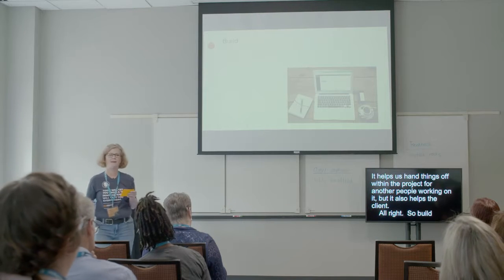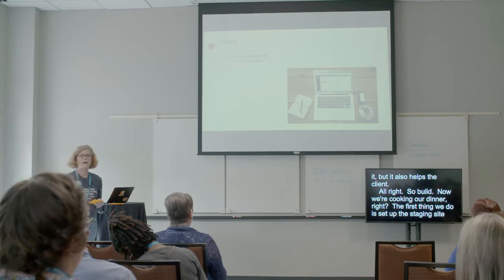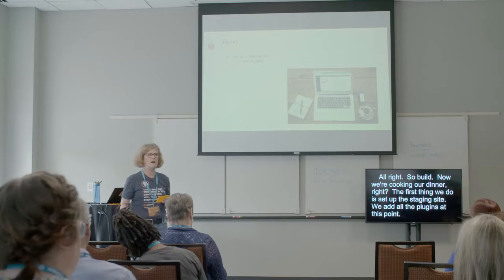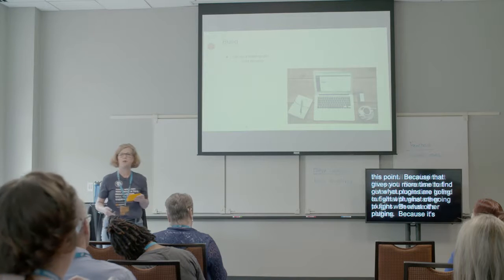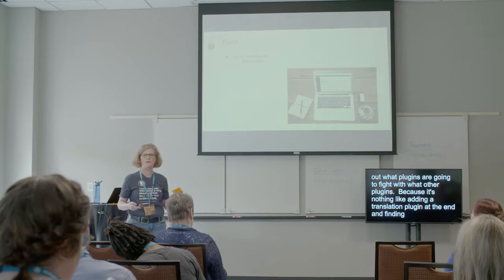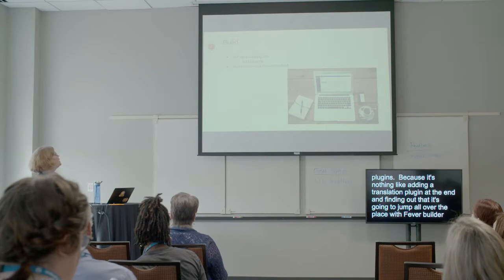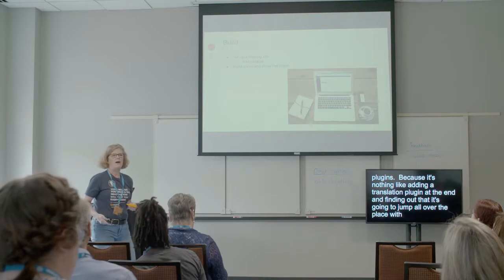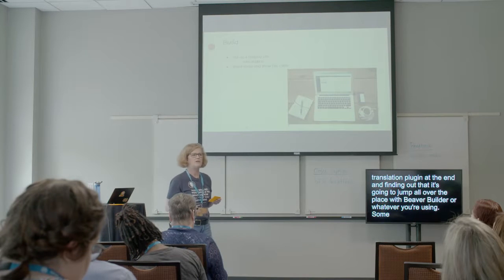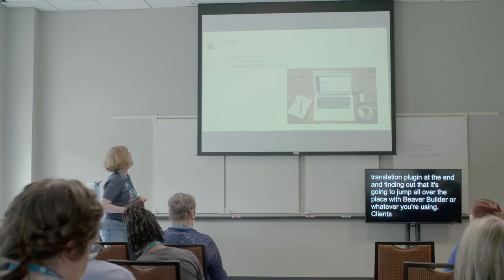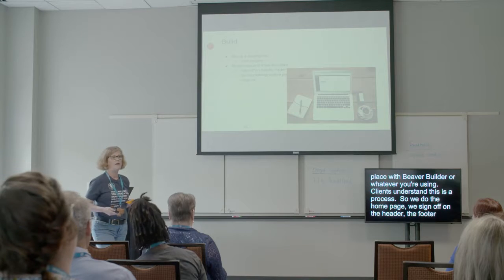So build. Now we're cooking our dinner, right? The first thing we do is set up a staging site. We add all the plugins at this point. Because that gives you more time to find out what plugins are gonna fight with what other plugins. Cause it's nothing like adding a translation plugin at the end and finding out that it's gonna jump all over the place with Beaver Builder or whatever else you're using.